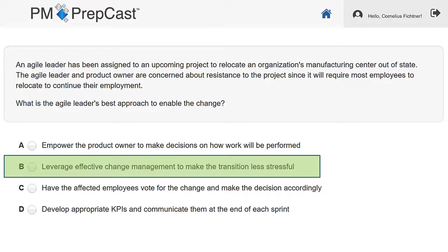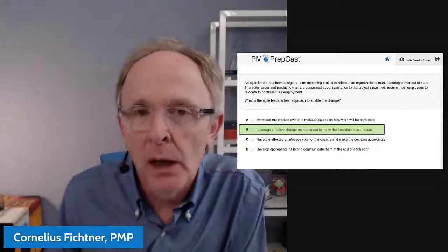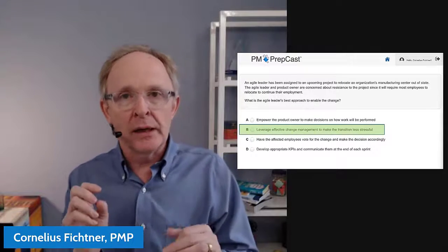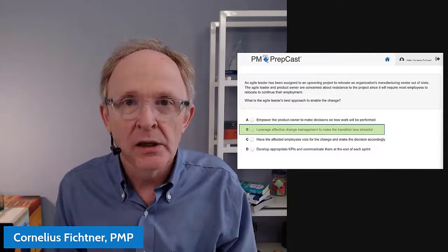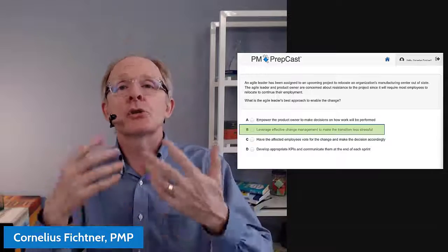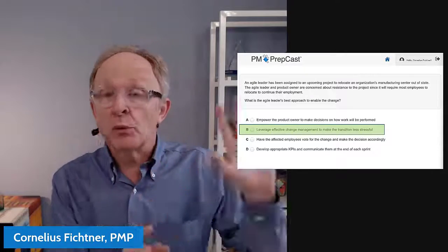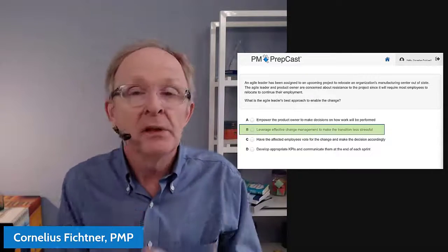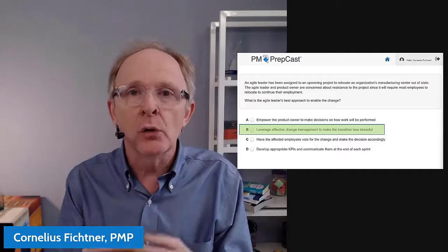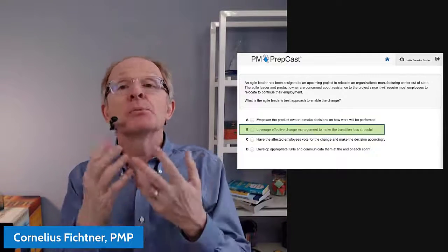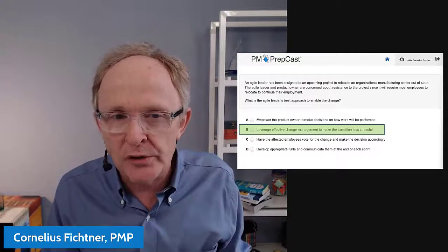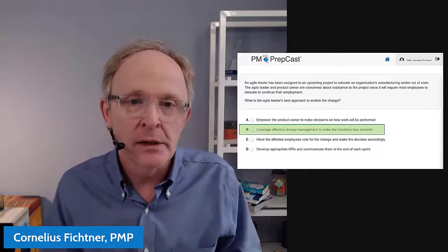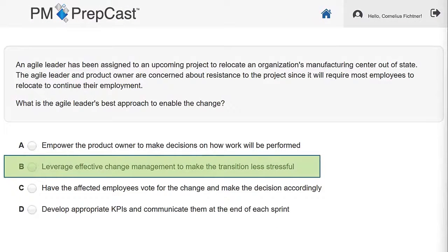A little while ago here, we had the scenario where we talked about, you have to get approval to make a change to the risk register. That would be change control. Okay, that was the wrong answer back on that particular question, but that is change control, requiring an approval to make a change, whereas change management is to put the appropriate processes and the approach in place so that the change can go through. Okay.